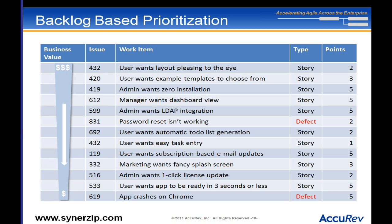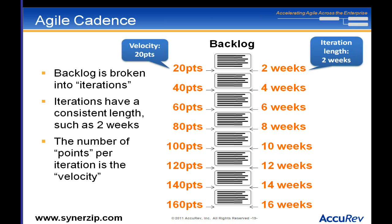We have the story points estimated out, but business value is a little trickier. What is the business value of this story versus another? It's not always easy to figure out, but generally you can say that even if you don't know the exact value, one has more business value than another. So rank them from most to least business value — however you would do that in your organization, perhaps through a business analyst, product owner, or product manager.